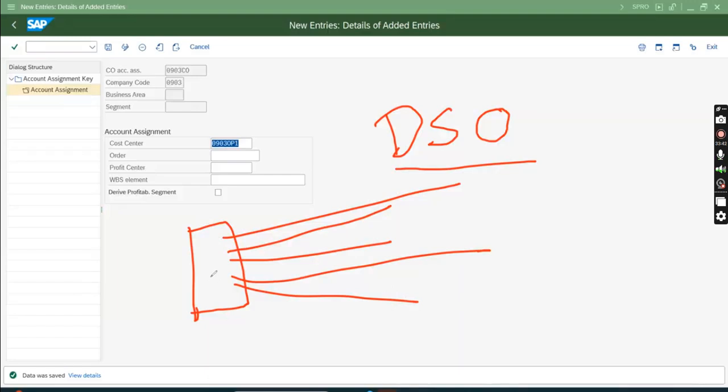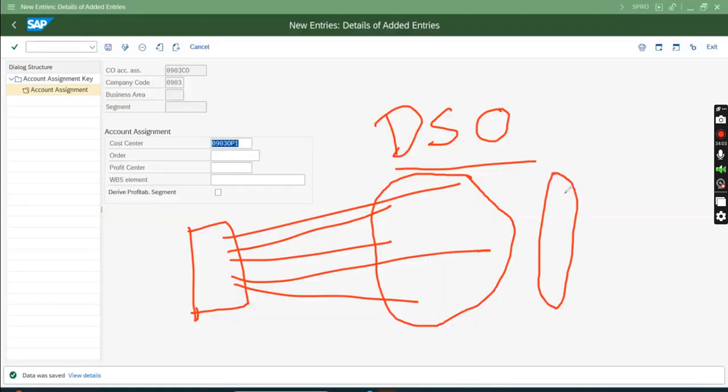So if you have a PMO, then you will go to the PMO. The PMO will create a new code, a new timesheet code or time clocking code, and they will give it to you. So in the initial days, maybe the initial 2 or 3 weeks, there will be no code. So you have to book your time into a temporary code, a sample or test code.